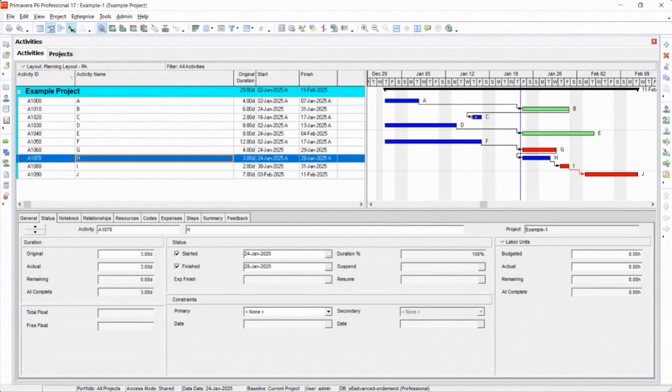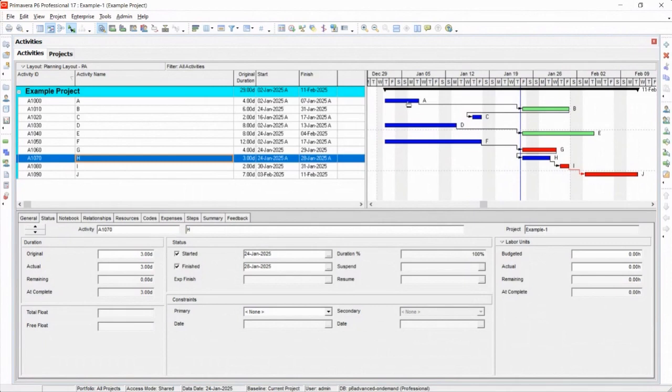But instead, I did A, and then I did C, and I skipped B altogether. So when I do that, that's what we call out-of-sequence execution. So when I have an out-of-sequence situation like this, which tends to happen, Primavera is keeping the logic alive. It's saying, hey, all right, you screwed up. You did A, and then you did C, and you didn't do B. So the next activity right after the data date, the first thing you should do now is B.